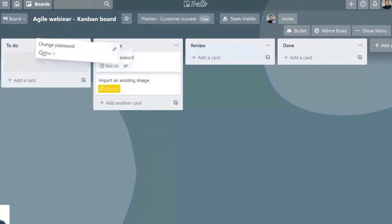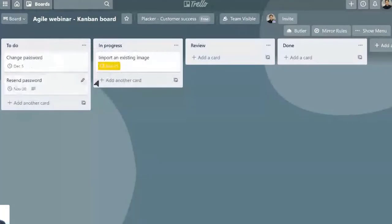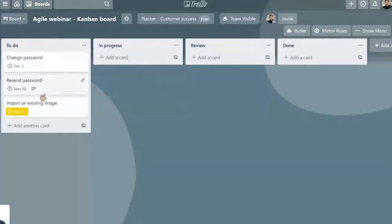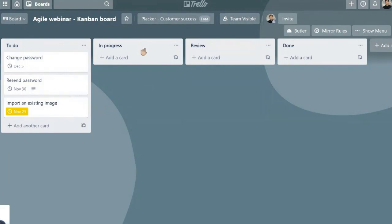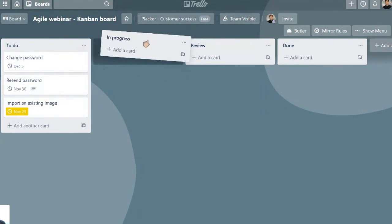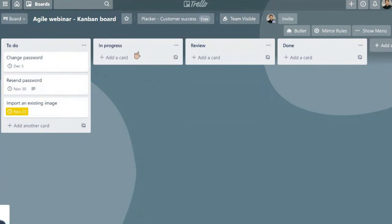Usually what we're going to do, and what is considered a good practice, is to limit your work in progress. Your work in progress is exactly this second column, which are things that we have started but not finished.